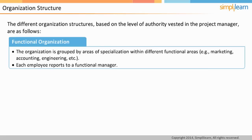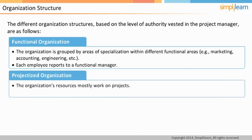The next type of organization is projectized organization. In such organizations, there are no departments. The organization's resources mostly work on projects. Team members report to a project manager. The project manager has complete control over the resources. When the project is completed, either they move on to another project or they look for some job outside the company.